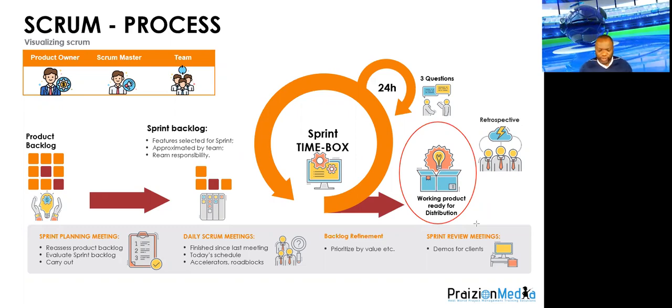Cross-functional teams produce functional product increments frequently, and that is because the teams collectively own the work and together have all the necessary skills to deliver completed work. Regardless of the overall agile approach, whether it's Scrum or Kanban, whatever it is, the more a team limits its work in progress, the more likely its members can collaborate to expedite work across the board.